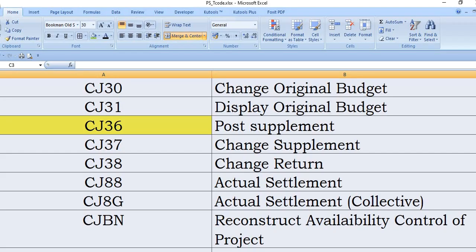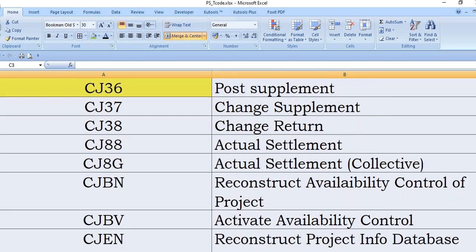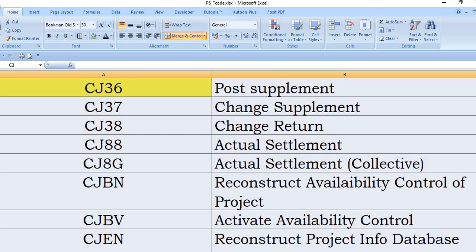CJ8G: actual settlement report. CJBR: This SAP transaction code is used to reconstruct the availability control of the project. Sometimes users working in network activity may get an error that the budget is exceeded, even when budget is already available in the project or WBS.